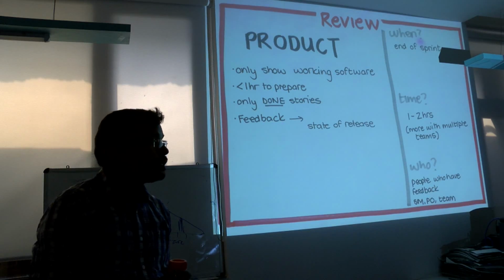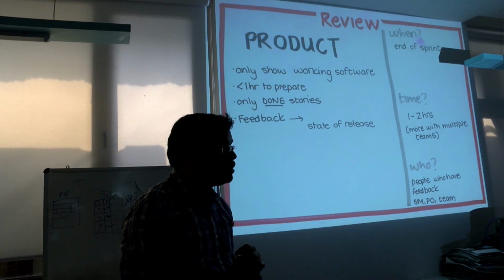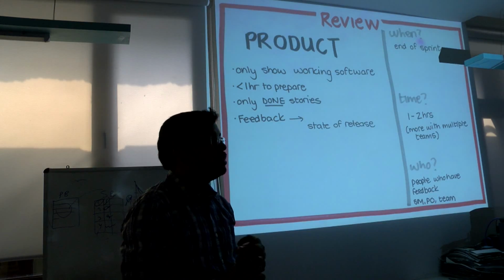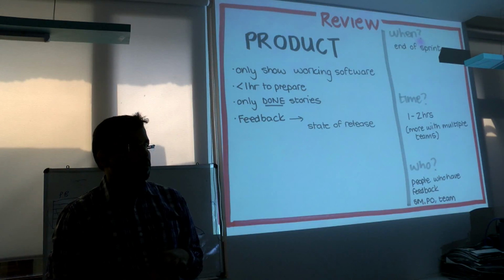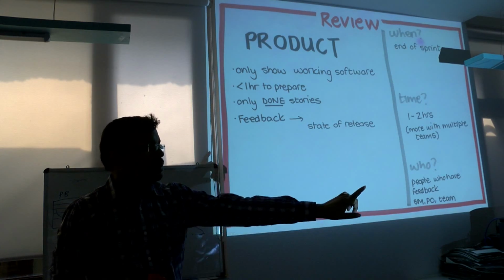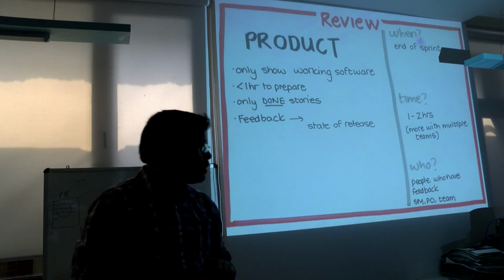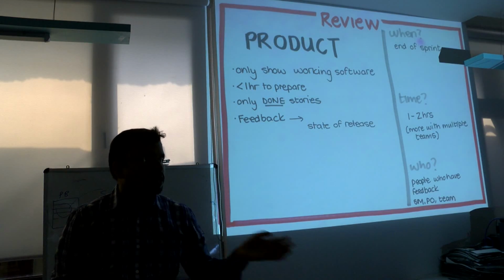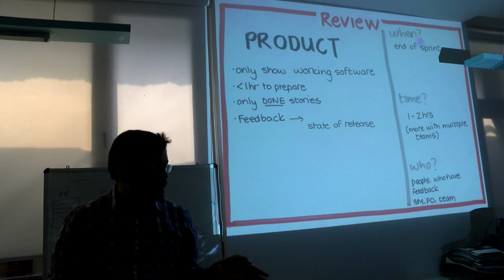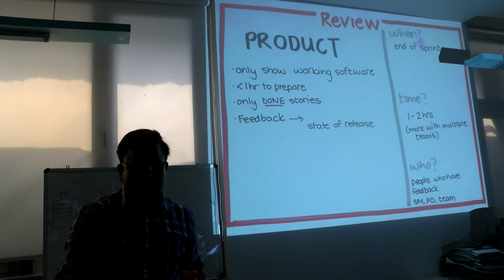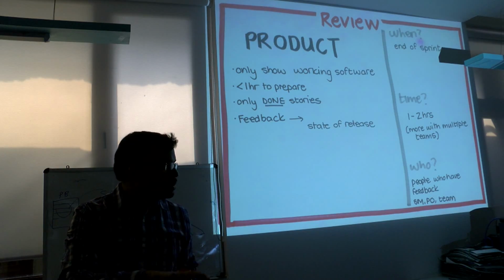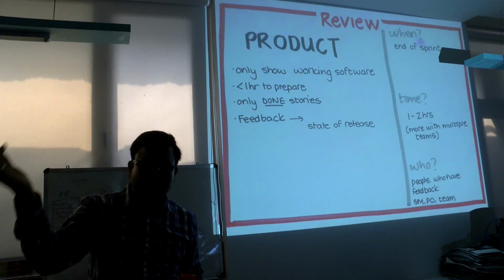So if I have done some task and it did not pass the acceptance criteria, it comes back to the product backlog. Can anyone from my team pick up the task, or only I have to? What happens when it comes to the product backlog is that in the next sprint planning, the product owner will ask, this task is not done, does it still have priority? If so, this task goes into the sprint and comes again as a sprint backlog item.